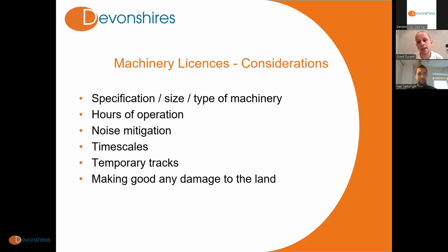Any noise mitigation measures that you might be obliged to carry out, any screening, or, I guess this also comes back into hours of operation, or even a certain level of noise that you're permitted to make, simply measured in decibels. There may be an upper limit on what you're permitted to do, so you need to be comfortable from a technical perspective that that's not going to be a problem for you.